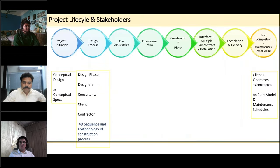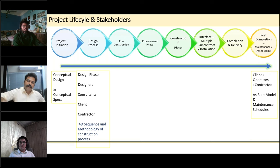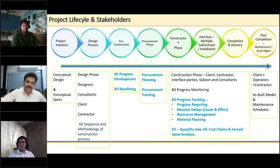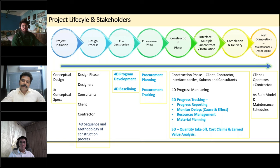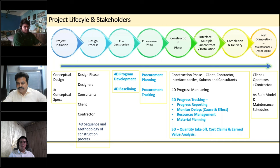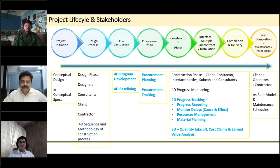When do we start implementing the 4D process in a project lifecycle? We can start in the design stages — preparing methodology using 4D to avoid non-constructive methodologies. In pre-construction, we can develop and baseline the program, plan procurement for DFMA manufactured modules. In construction phases, we can do progress monitoring, reporting, monitor delays visually, manage resources, plan materials, and perform instant quantity takeoff from readily available models. A cost-loaded program gives you earned value analysis and risk assessment of cost. After post-completion, it can be used as an as-built model for maintenance schedules. Overall, it can contribute to 80% of your job throughout the entire project lifecycle.